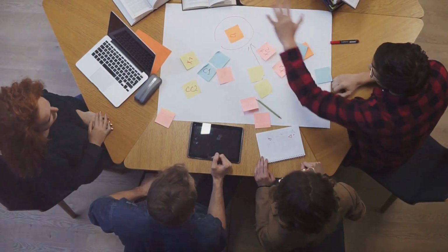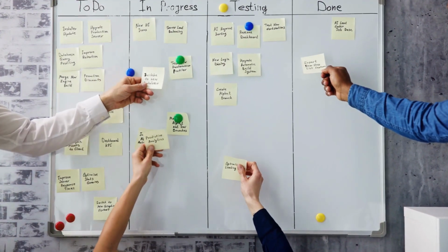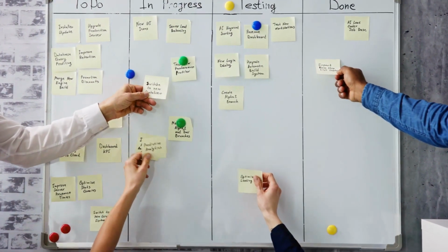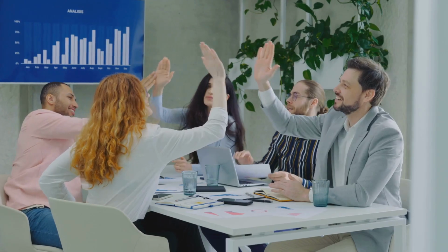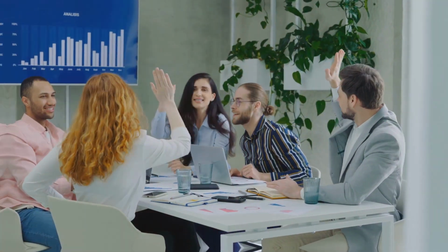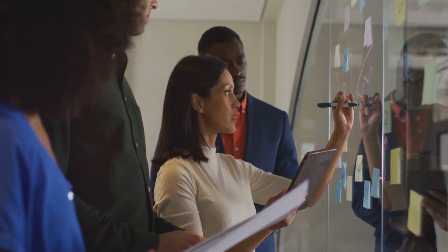For example, you might write, "You are an agile product manager. Based on this information, paste business requirements or meeting notes, create an agile epic description that includes a title, short narrative, business value, and acceptance criteria." This type of clear instruction helps the AI produce results that match agile best practices. The AI will then generate a draft of the epic.